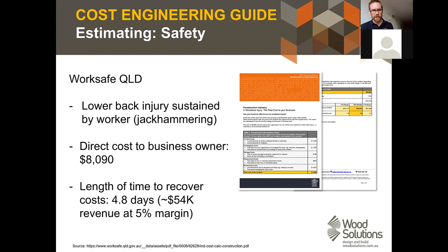From a safety point of view, obviously safety is number one on every construction site around the world, hopefully, but particularly in Australia. And no one really likes to think about it, but there is also a cost side to it. And I'm not talking about the cost of doing things safely. I'm talking about the cost of having someone injured on your site. If you have an LTI, or a lost time injury, there are a number of unforeseen, unexpected costs related to that, which may be making good whatever's been damaged when that injury has occurred, training someone to do that job, obviously paying medical expenses,